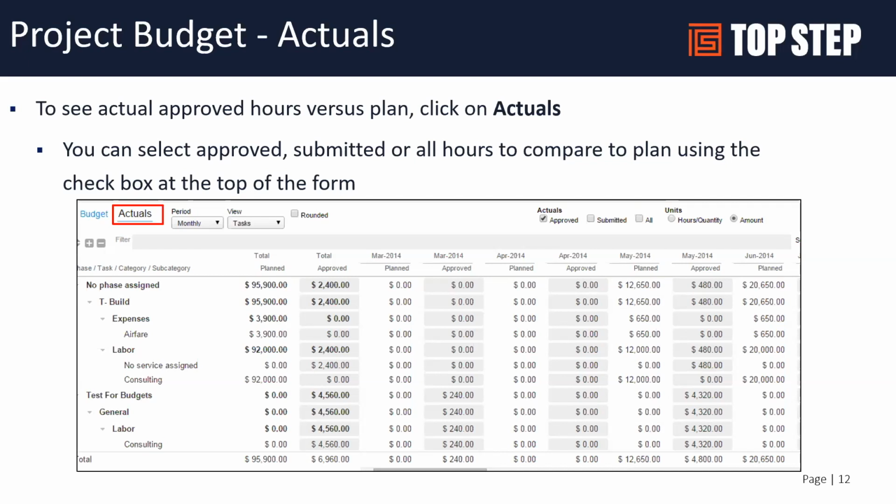So you can get earned value here. You can also get estimate to complete, as well as estimate at complete, all features of this budget feature. The ETC and EAC options were added at a later stage. So if you are looking to enable the project budget feature, you may also want to ask for the EAC and ETC features to be added on to that. And that again can be very powerful in reporting.